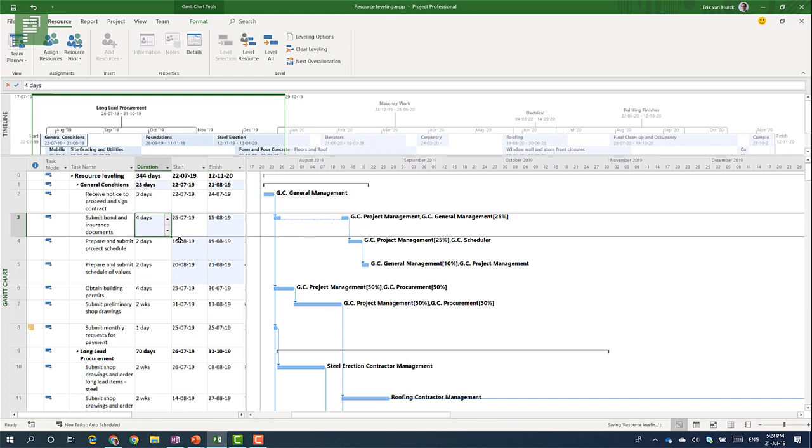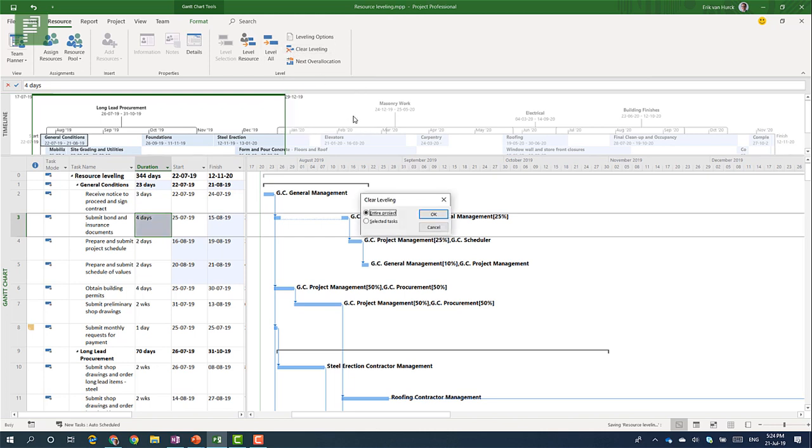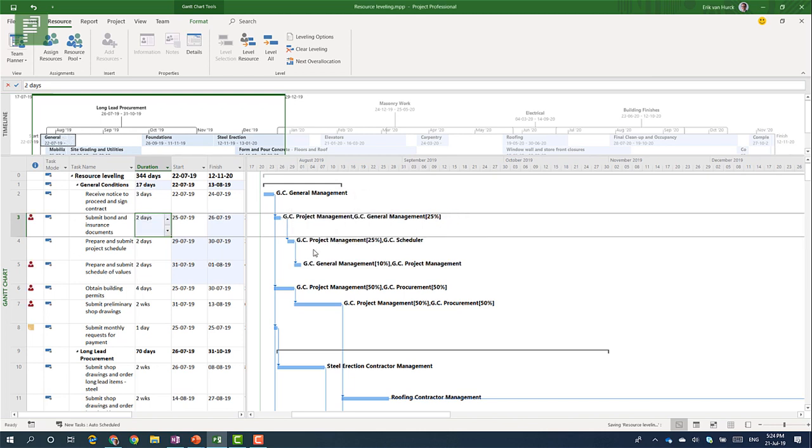So if we want to take a look at resource leveling not from a selection base but one of the other options we can easily clear the leveling that we've just done. And by clicking on this we can say okay well I want to clear the leveling for the whole project or just for specific tasks. Let's click on the entire project and let's see what happens. So everything is set back to the situation that was happening before that leveling. So this is easy for a what-if scenario kind of way of working. Seeing what would work best for you in your project.